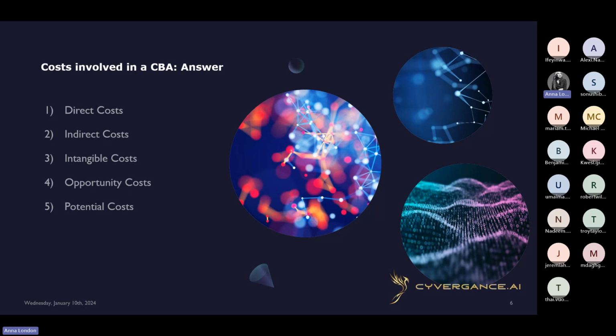Then there's intangible costs. That includes customer satisfaction, impact on productivity, employees, all that. And there's opportunity cost. That includes alternate investments, like buying a plant versus building a plant. Do we lease the data center, or do we build one ourselves? And then when we go into compliance, there's the potential cost of the risk involved. We involve regulatory risk, competition, environmental effects, and a lot more. So those are, by the book, the five types of cost attributes when we talk about a CBA, okay?